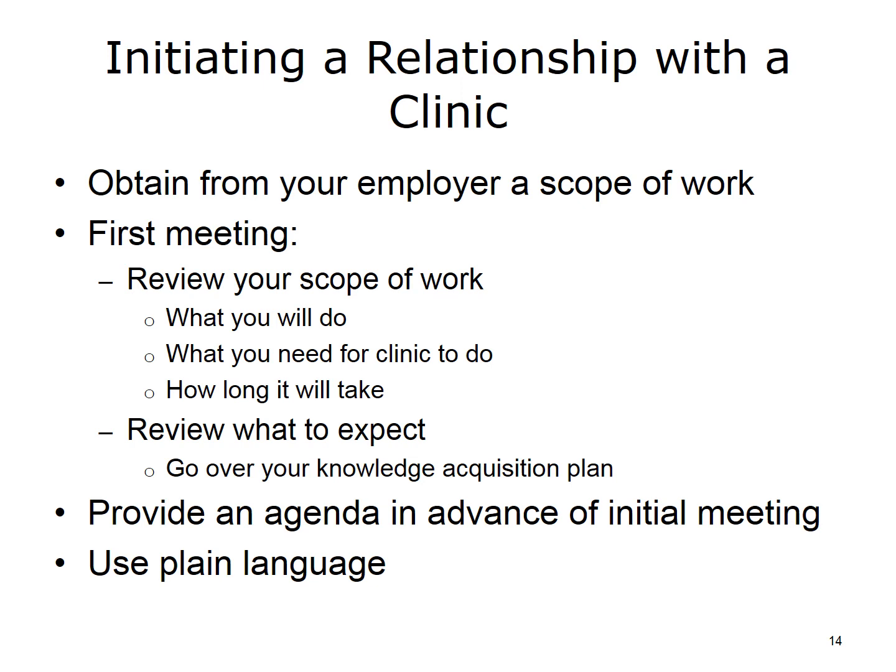At the first meeting, review your scope of work with the primary clinic representative. Decide what you will do, what you need the clinic to do, i.e., set aside time for meetings, interruptions, or a half Saturday for process walkthroughs, and how long your work, the project, meetings, and interruptions will take. Also, review what the clinic should expect with respect to its time commitment and what your deliverables are. Be sure to go over your knowledge acquisition plan.